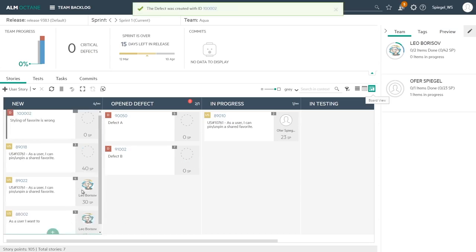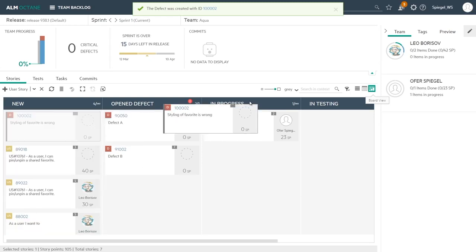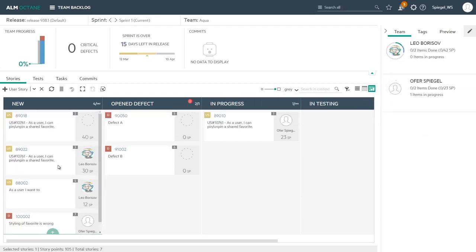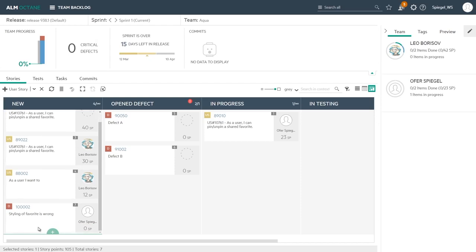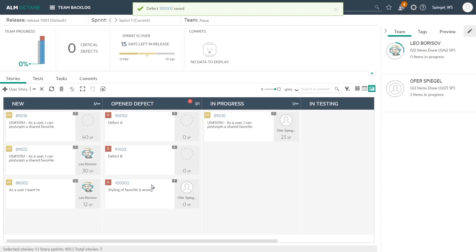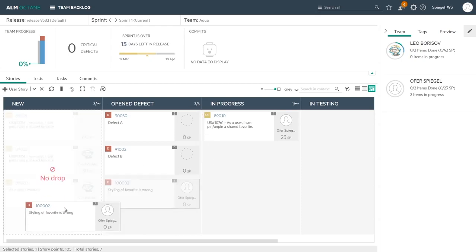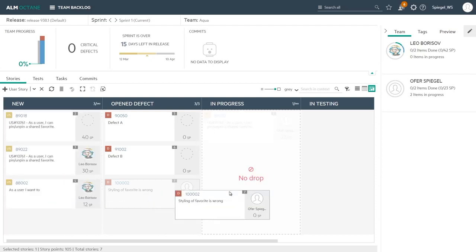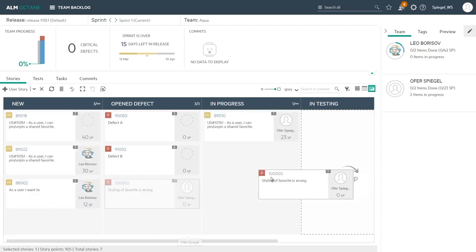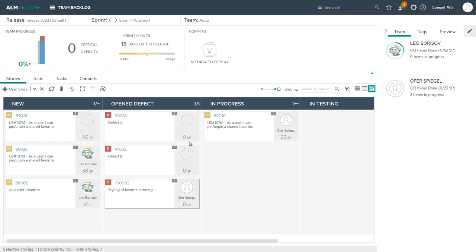For example, that's a defect: styling of the favorites is wrong as a defect that I need to handle as part of that sprint. I have that defect, I can select that and by means of drag and drop I can assign it to a particular team member. I can drag it onto the open defect column and working with Kanban, we get that reflection of the WIP limit here. I've exceeded the WIP limit which was one, and now I have three actually in that column. As a team leader, I have the permission to modify that WIP limit. So in this case, I want to allow that ability to keep that on three stories in that lane.